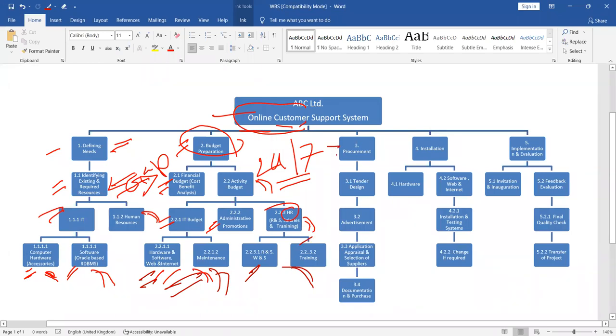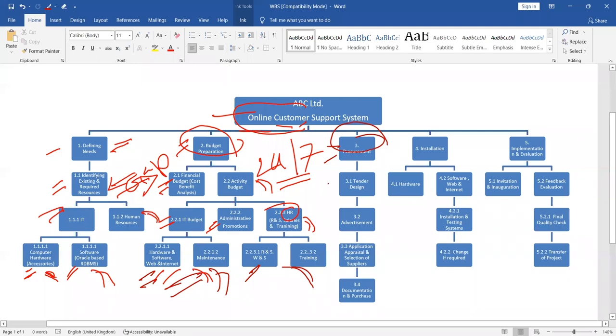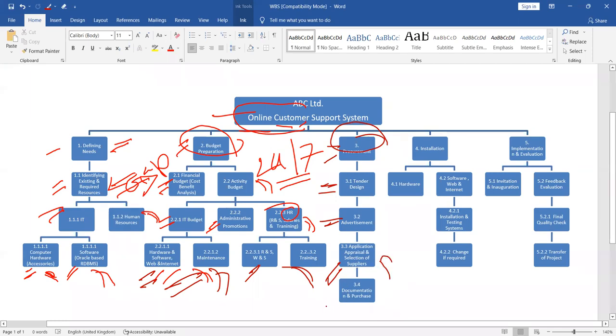Number three is procurement. You can have only one task related to procurement. We say procurement means purchase. But you see they have explained very properly what are the tasks you should consider within procurement. You see the first one, you have to design tender. The second one, you have to go for advertisement who are interested to participate. Third one, after receiving application, you have to go for application appraisal and selection of suppliers.